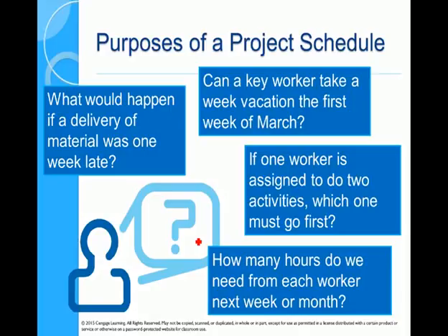Once we have a model of the schedule, we can start answering some what-if questions. If material is late, what effect does delaying one activity in the project have on all the subsequent activities? All the things that haven't been done depend on things that have been done. If one of those activities is delayed, what impact does that have on the rest of the project? So your project schedule needs to be flexible enough to answer what-if questions, and flexible enough to track the project and make changes in real time.